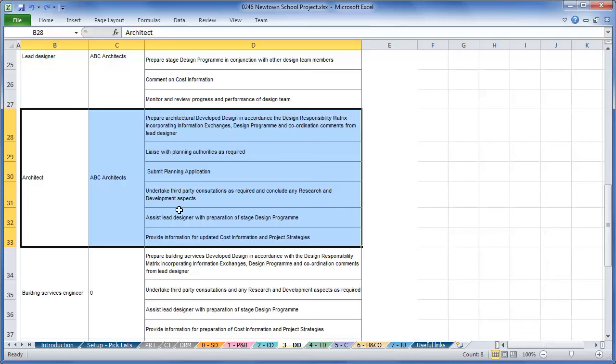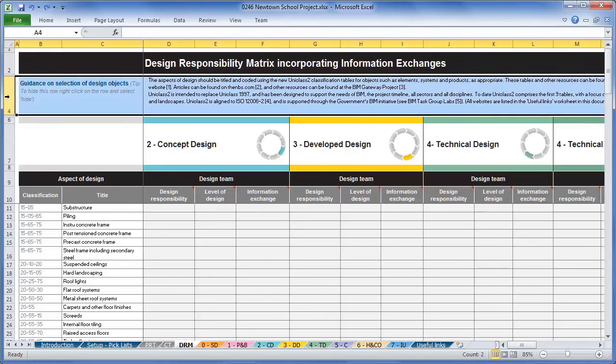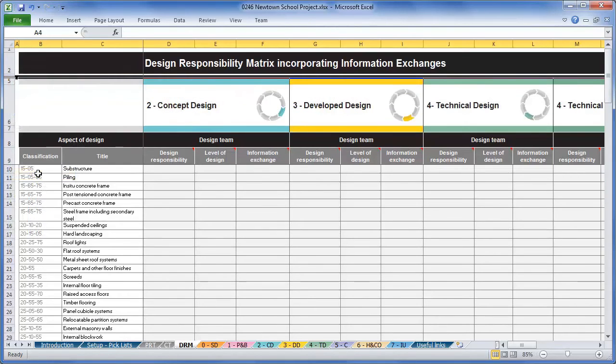It is recommended that the Design Responsibility Matrix is prepared at the outset of a project during Stage 1. This ensures that the fees of each party are based on agreed deliverables at each stage and on the areas of design that each party will be responsible for. The table allows the allocation of design duties between design team members and also to the specialist subcontractors via the building contract.